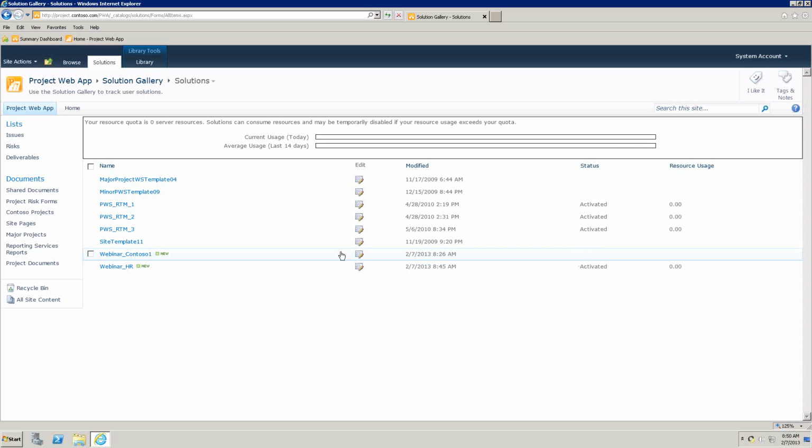At this point, if I really want to get rid of it, I can open the drop down again and I now have a choice of activate it to turn it back on or delete if I really want to get rid of it. So what you may want to do here in terms of managing your templates is if you have a more updated template that you've created but you want to test it for a while, you might keep the old one around. So deactivate the old one, but don't delete it until you're sure that the new one is working, that you haven't broken some functionality.